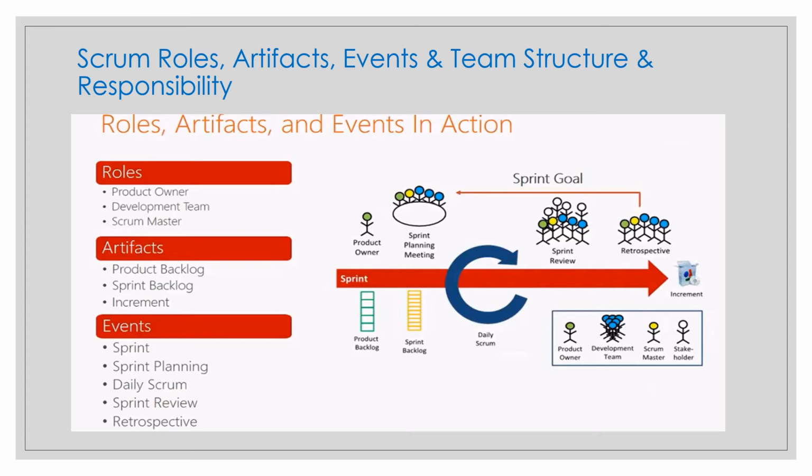The last event of the sprint is a retrospective of the process. The Scrum team looks back at how the sprint went and figures out a way to improve their development process, and then they start from the beginning with the next sprint planning, and the cycle repeats.